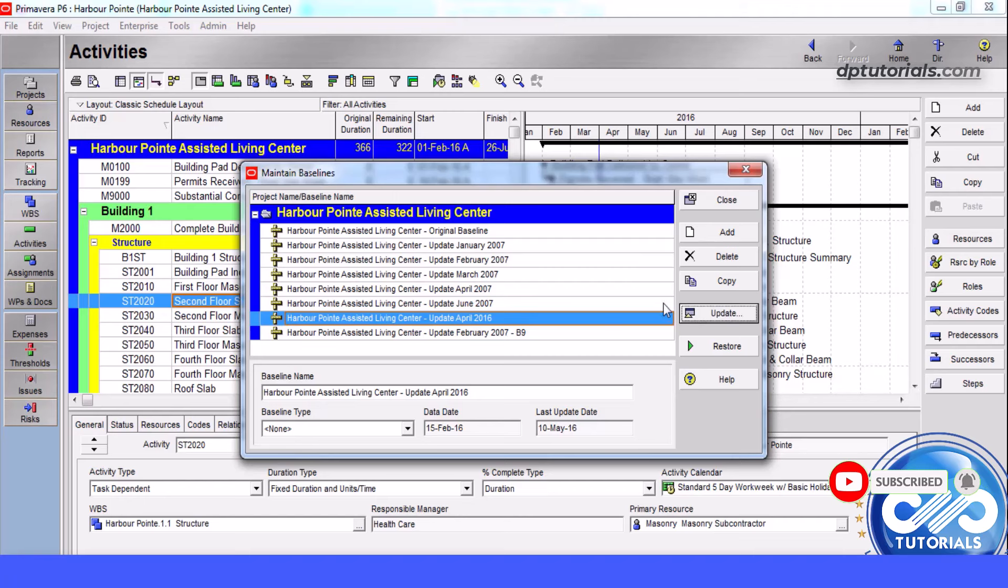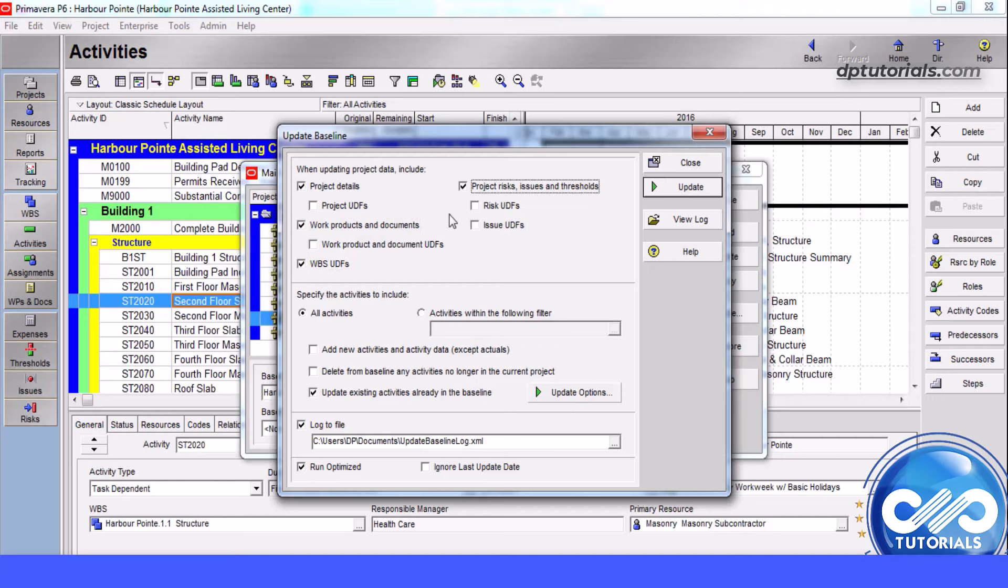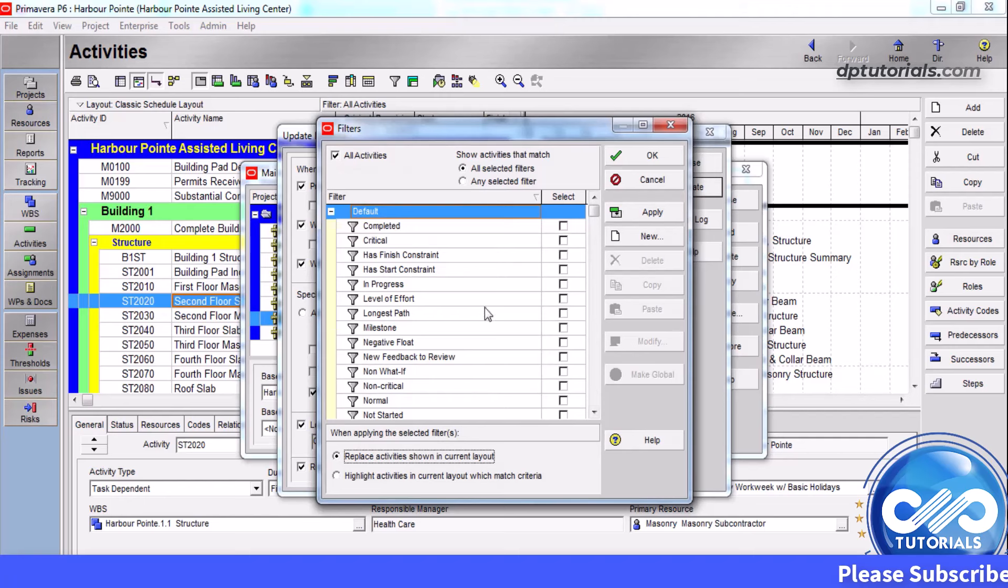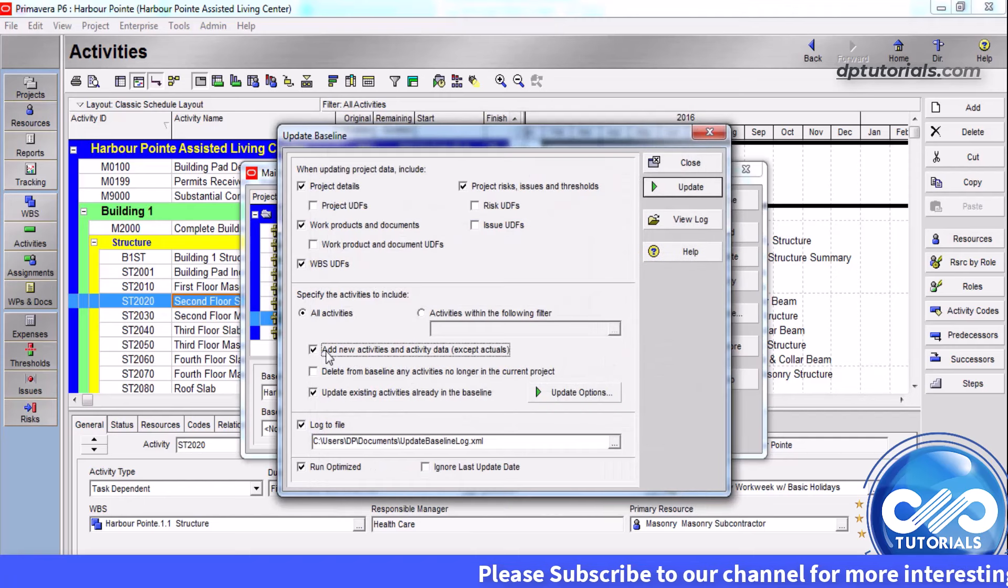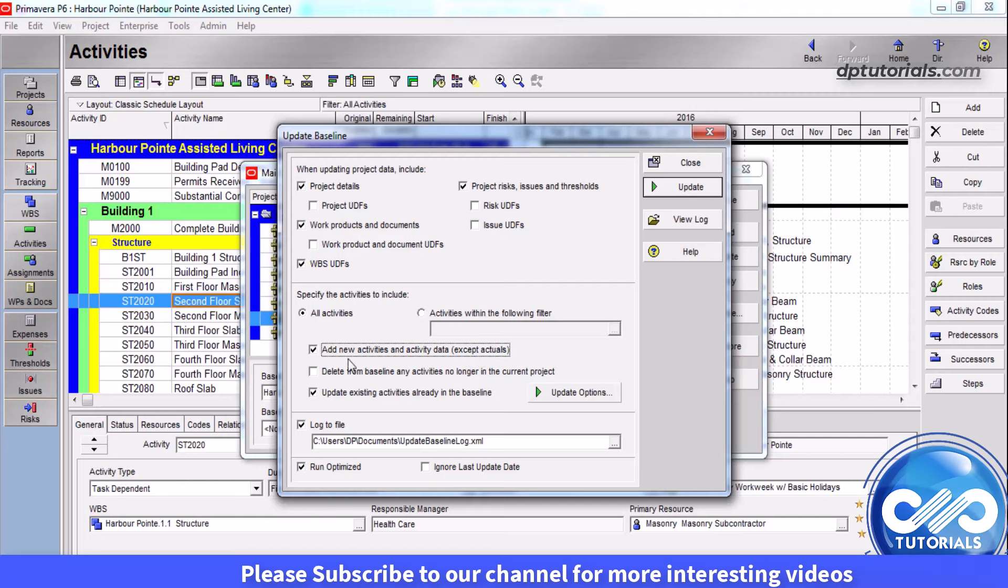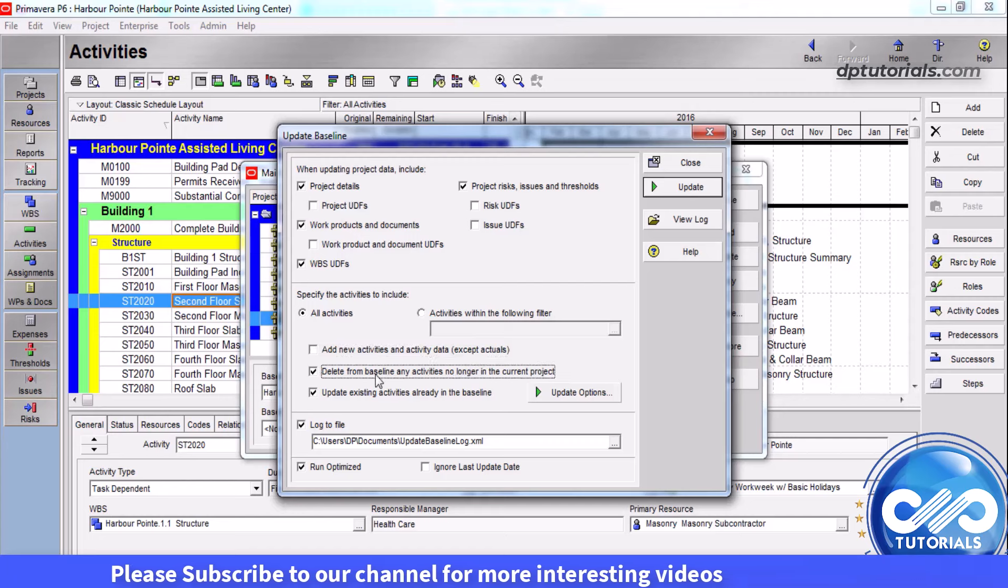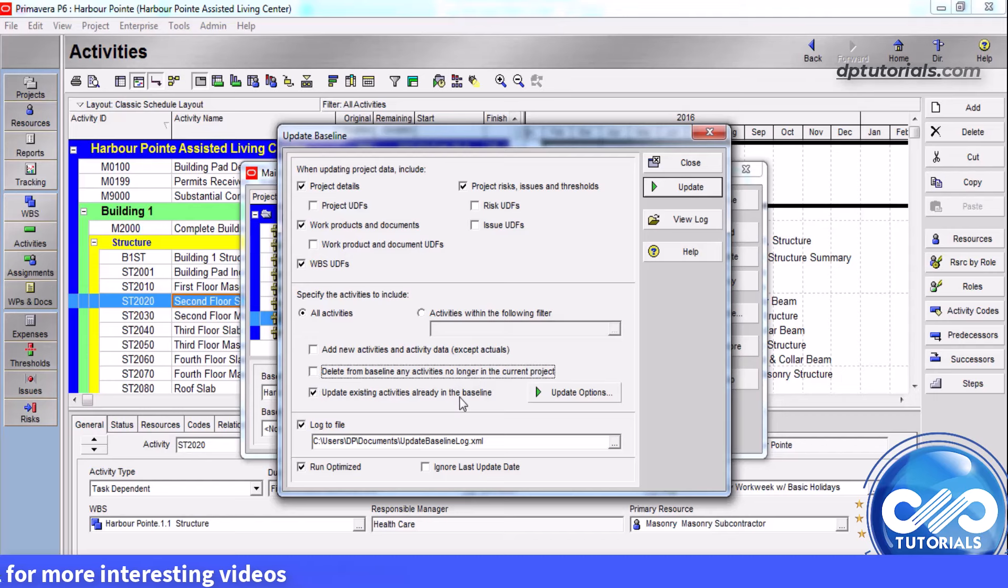Select the project level details that you want to update in this top portion. Here, choose to update all activities or select a filter to update only some activities. Choose to add new activities and delete activities that are no longer in the project, and update existing activities.